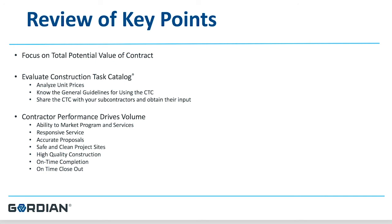Evaluate the prices in the construction task catalog — you'll need to get your bearings. Is it reflective of your local market? What do your subcontractors think about the unit prices? You need their input to set your adjustment factor. Subcontractor markup needs to be taken into account in your adjustment factor. Know the guidelines for using the CTC as published at the very front of the book. Share the price book with your subcontractor community, have them assess their sections, and potentially have them bid an adjustment factor to you — this is especially true for mechanical, electrical, and plumbing sections.